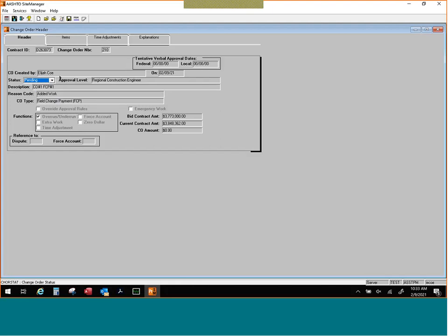This should also come with a warning as well. You should not switch a change order back to draft status without letting your RCO know first. But we have, and they said it was good. We're going to change it back to draft.